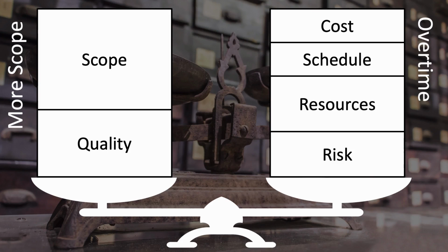However, it's important to keep in mind that risk is often affected when you make changes like this. In this case, you run risks regarding resource availability. The more you expect of resources in a given day, the more likely it is that their availability may not be what you've scheduled.